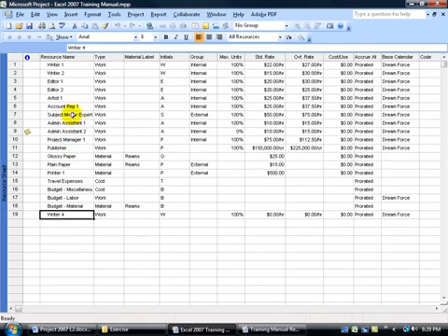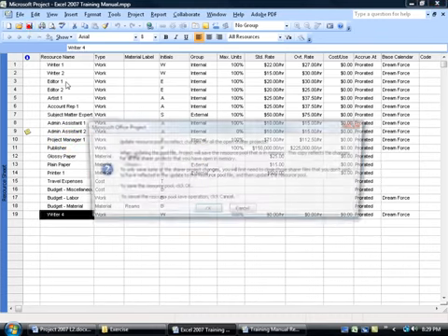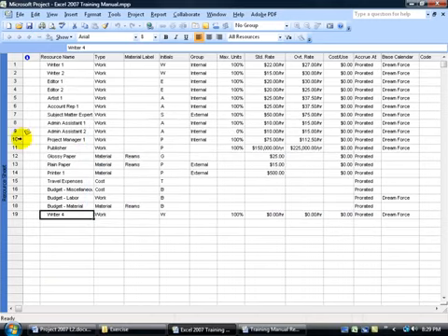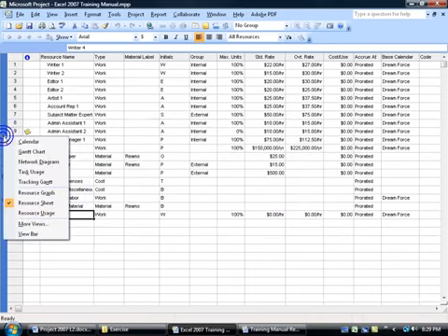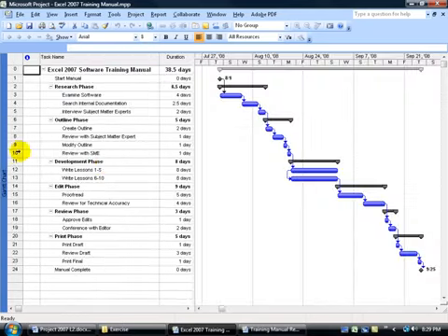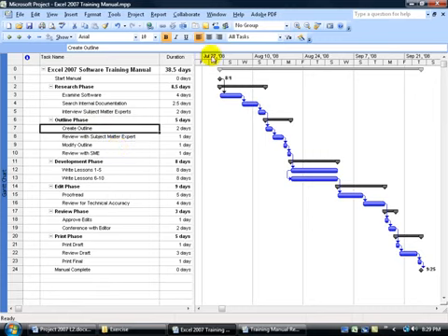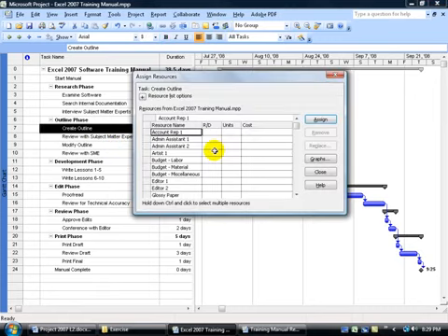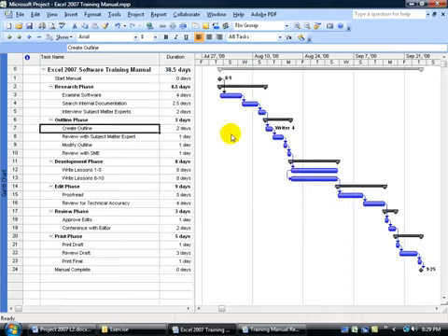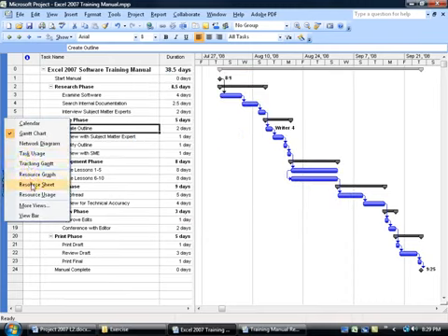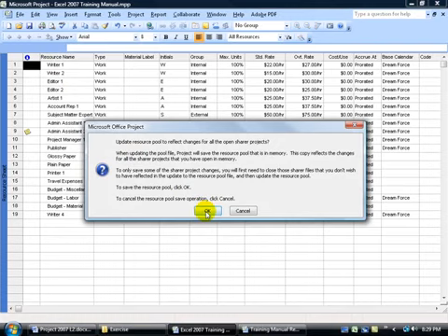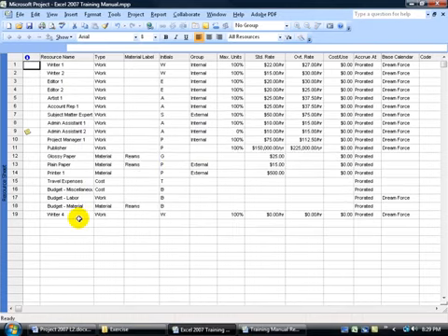Now, like I said, before I click Save, and it gives me that warning, click Save, we'll click Cancel. We'll come over here and assign Writer 4 by right-clicking on the collapsed view bar, going to the Gantt chart, pick your task, and then go ahead and assign Writer 4 to it. Come up here, click on the two dudes who are assigned resources, and there's a listing again of all the resources, including, if I scroll down to the bottom, my Writer 4. Click Assign, go ahead and close. Let me right-click and go back to the resource sheet, click Save, click OK, and Writer 4 stays.